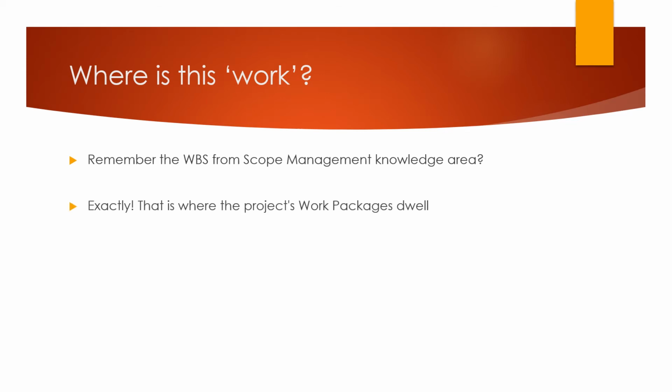Now, these work packages are further decomposed into activities. So you have your WBS, which you have already created, the work breakdown structure. The work packages are listed in the work breakdown structure.